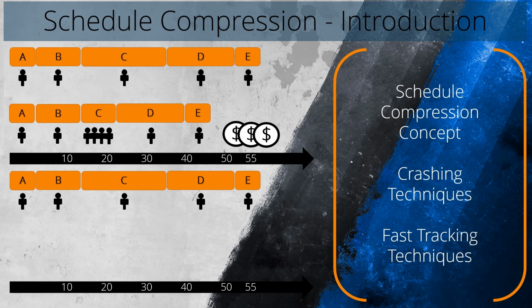However, there is a trade-off involved in crashing an activity. The additional resources may increase the project's cost, and there may be limitations in resource availability. The project manager needs to assess these factors before implementing the crashing technique.